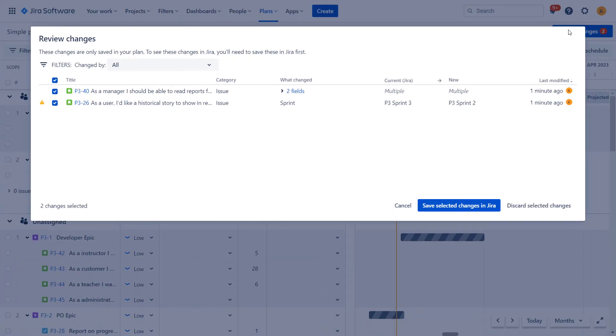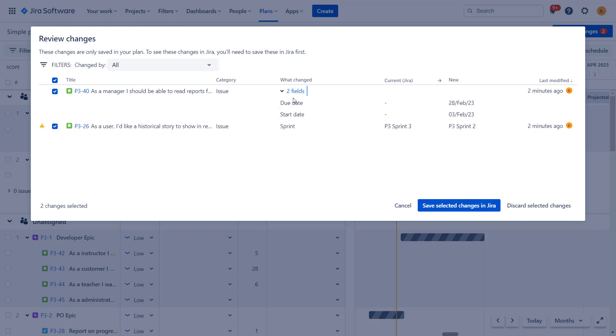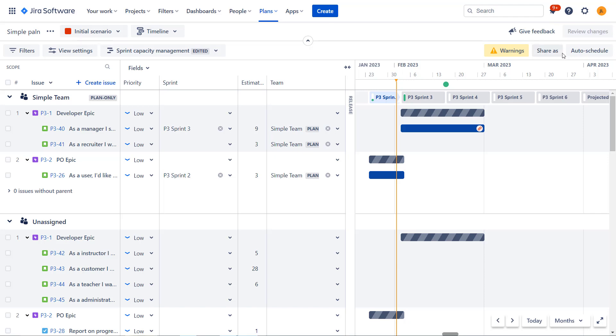So I will go over here. There are basically changes. The moment I will confirm these changes, they will be applied to Jira issues. This means that first of all, in this case, the sprint will be updated. The start and end date will be updated on the Jira issue level. When this is done, this scenario will basically be, it will be now synced with Jira issues, but the other scenario will not be affected.